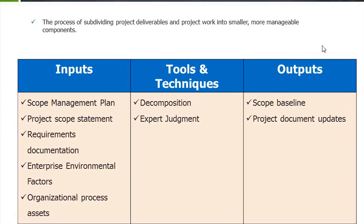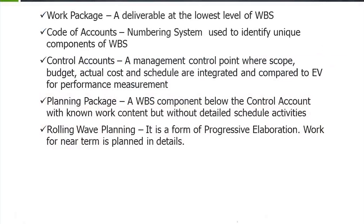The work package is the lowest level. We understood terms like code of accounts, which is a numbering system used to identify unique components of the WBS. Control accounts are management control points where scope, budget, actual cost, and schedule are integrated and compared for performance measurement. The planning package is a WBS component below the control account with known work content but without detailed schedule activities.